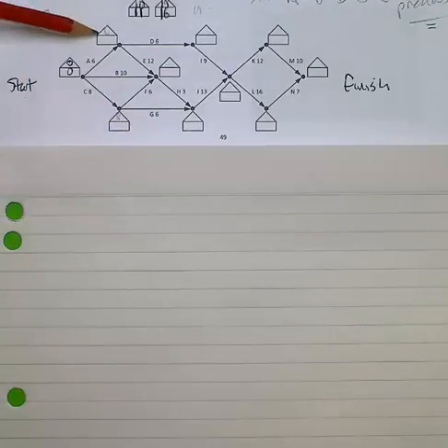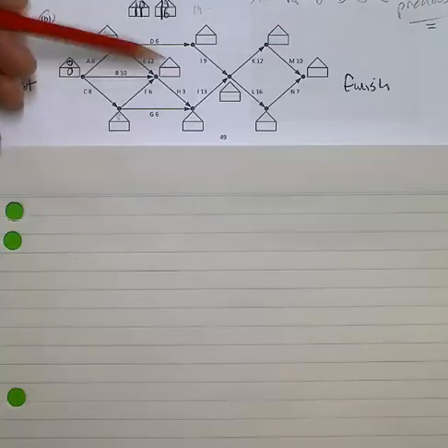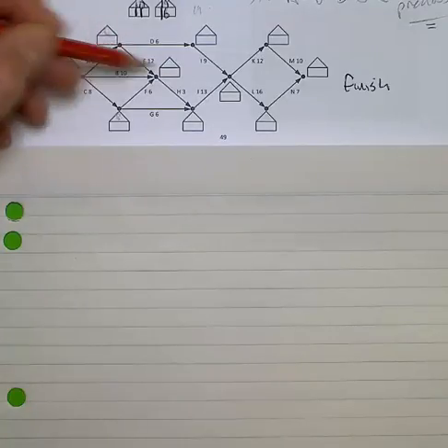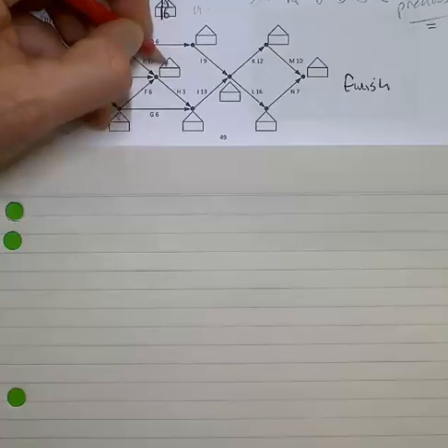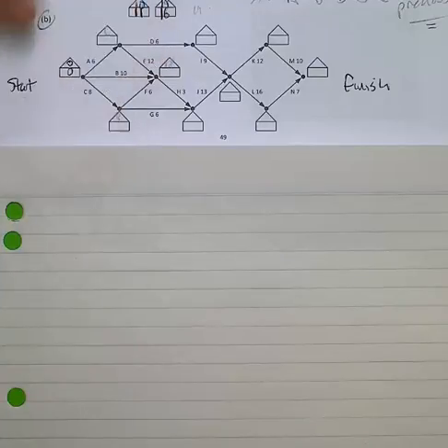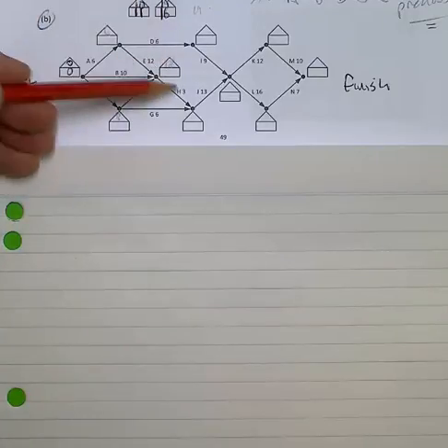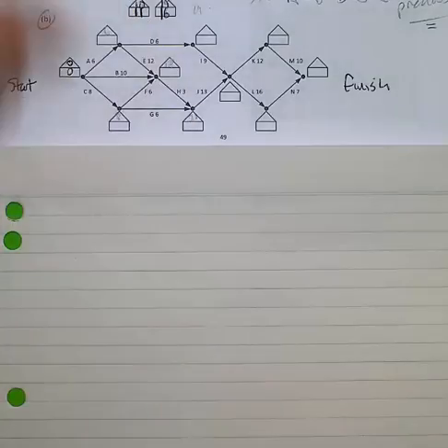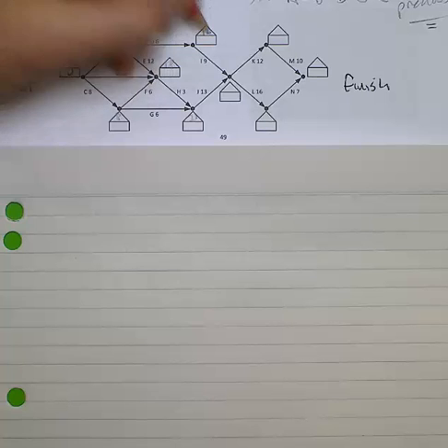Now I've got a junction choice for E. The earliest I could finish that, there's an 18 option and a 14. I've got to go the 18. So that in turn makes this bottom junction 21. I'd better get back to the top one. The earliest that can start is 12.